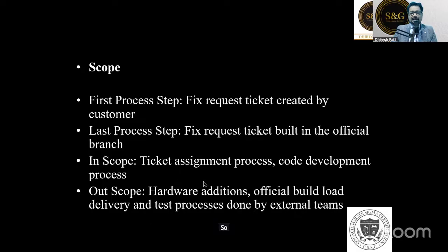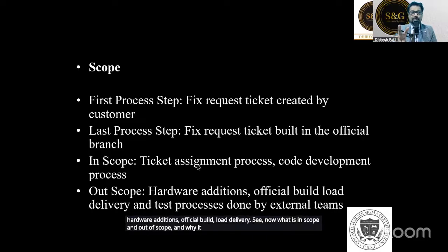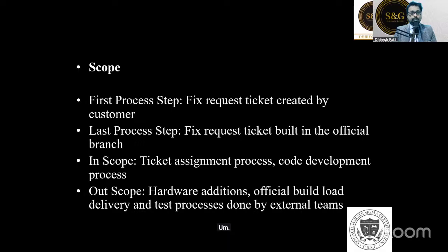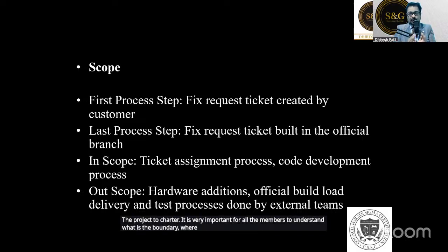In scope is the ticket assignment process and code development process, and out of scope are hardware additions, official build, and load delivery. Why is it so important to understand what is in scope and out of scope? When it comes to the project charter, it is very important for all the members to understand the boundary, where the focus area is, and what is not the focus area.